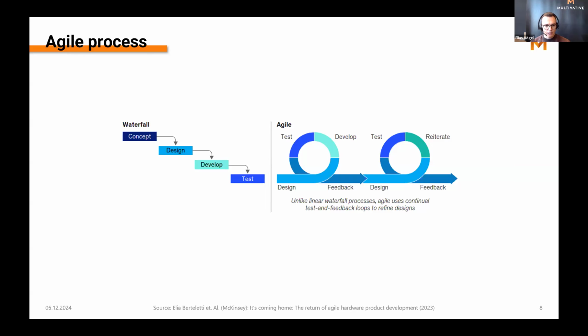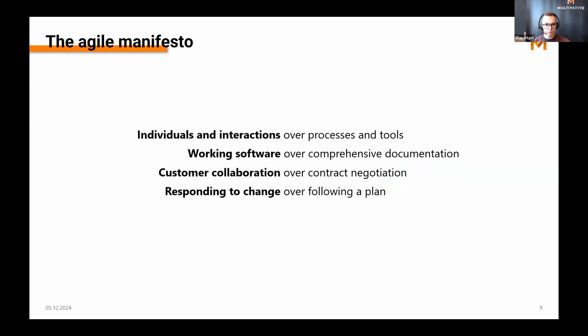And at the start of a cycle, it is decided which tasks will be implemented in this round. And at the end of a cycle, there is time for reflection on how it went, if there were any issues that are currently causing problems, what is working well and should be continued. Also on the level of the process itself. So we are also thinking about how we can improve the development process itself, but I'll come to that later on.